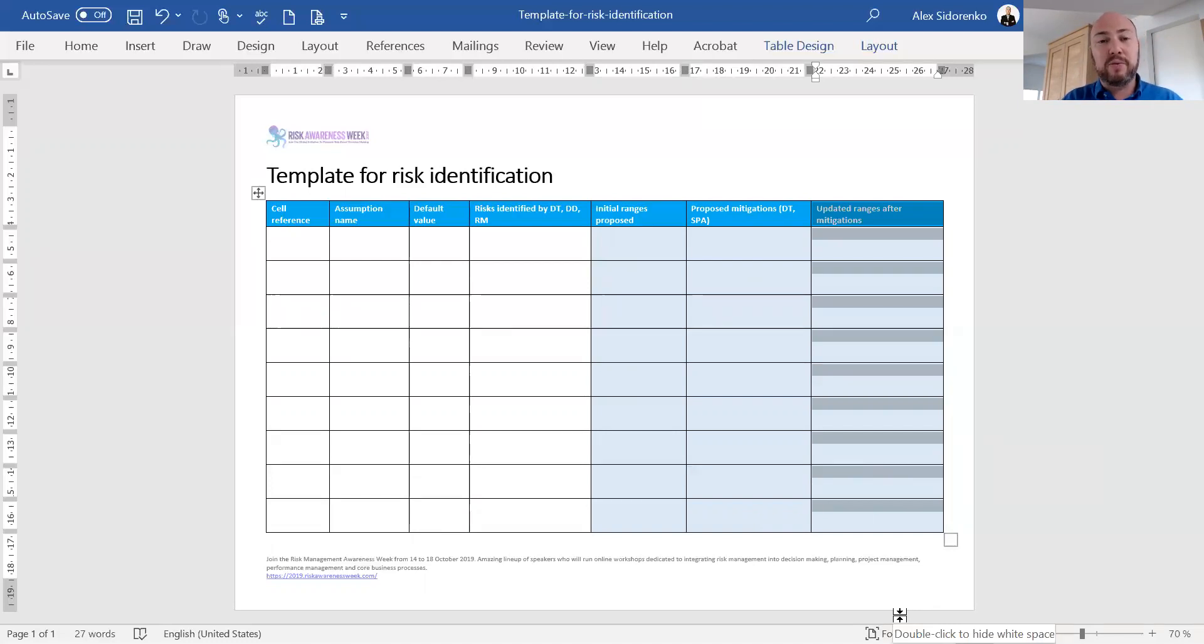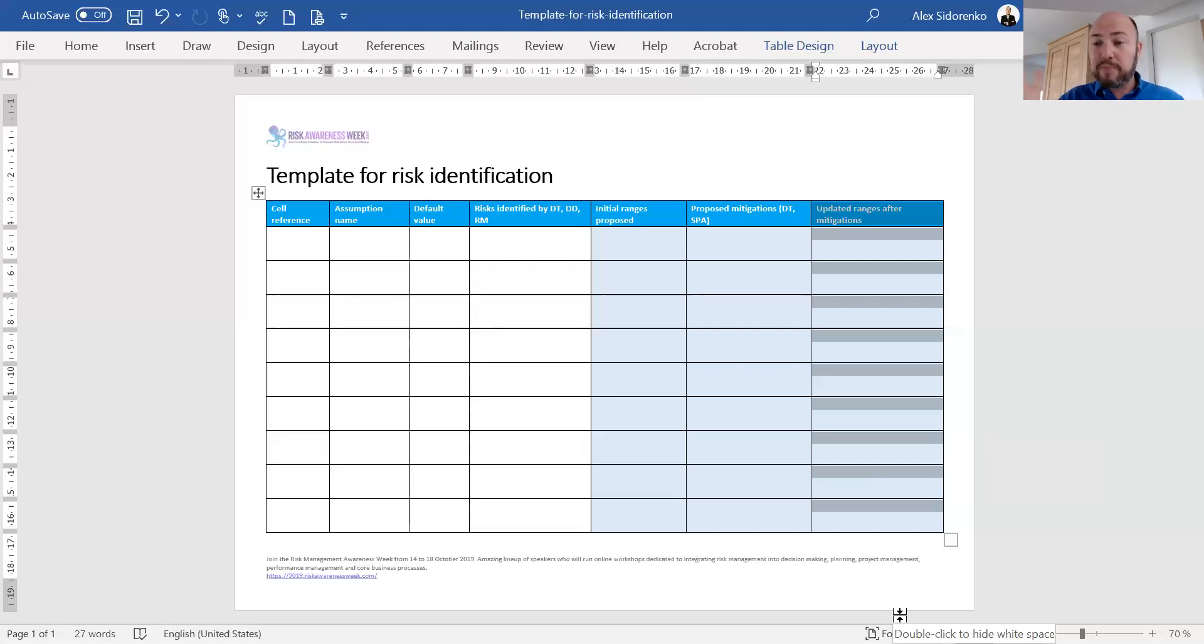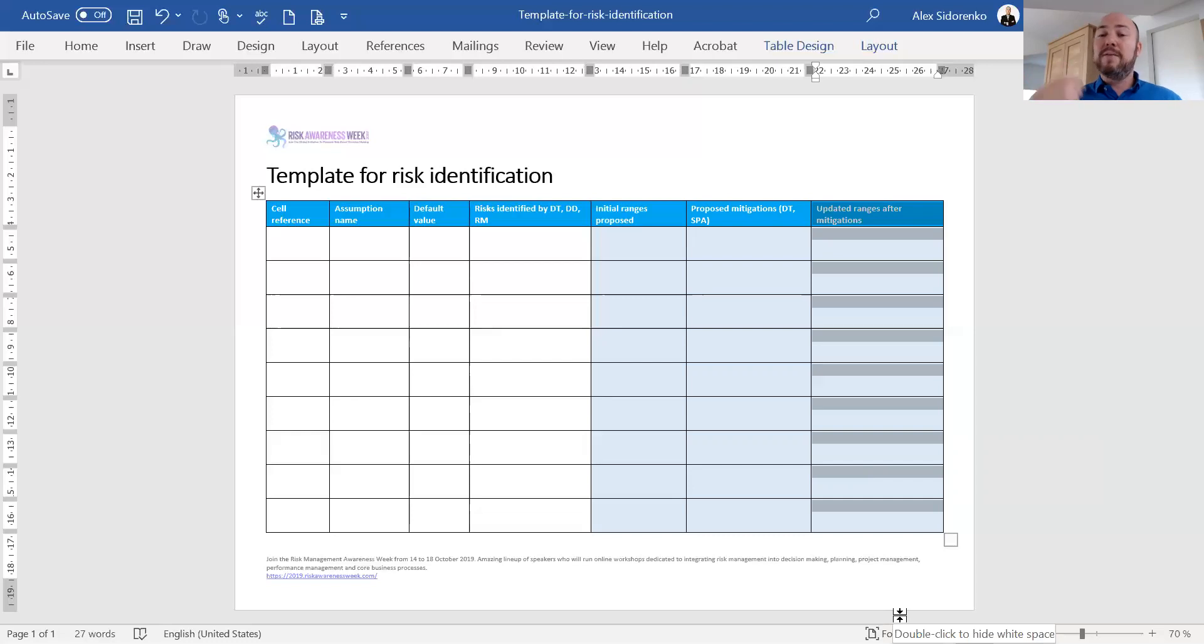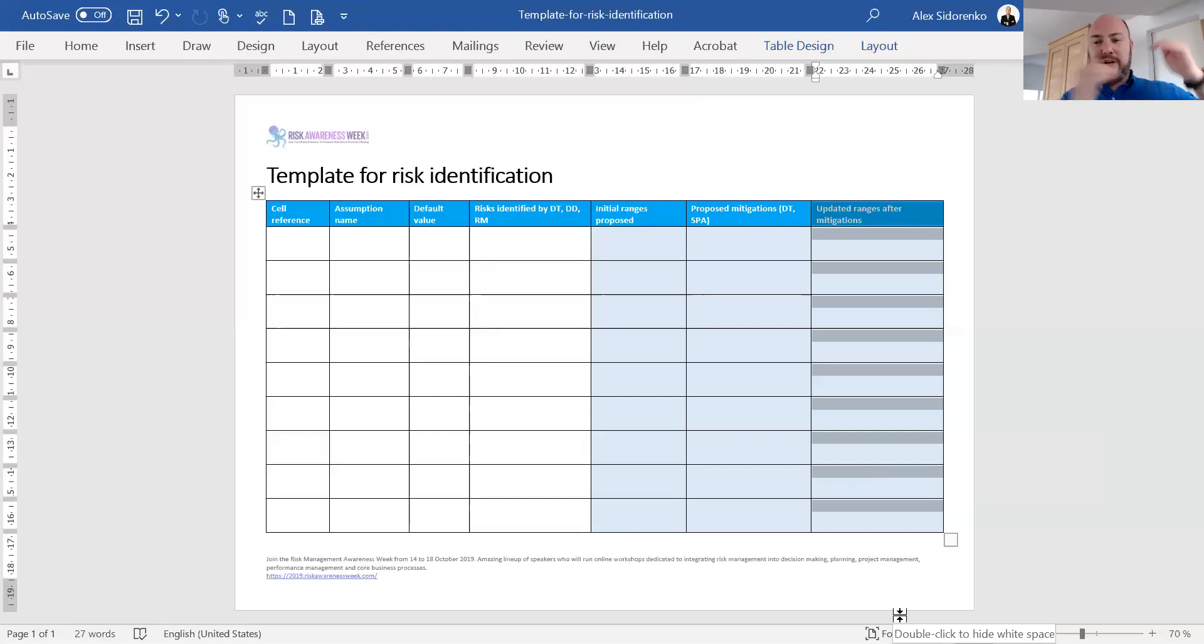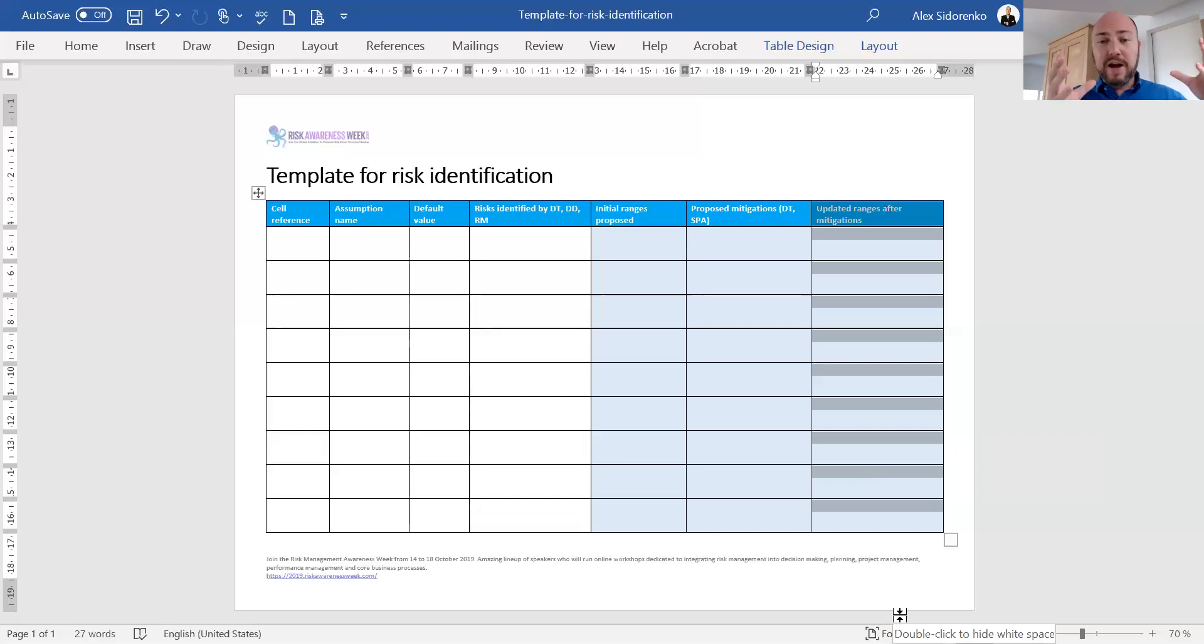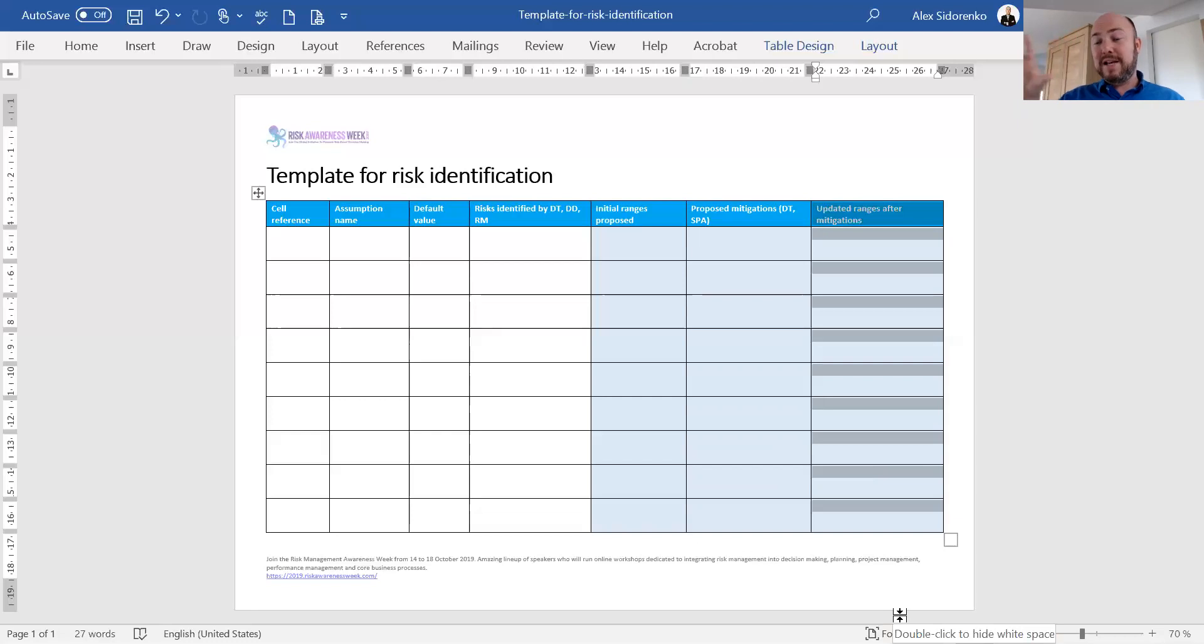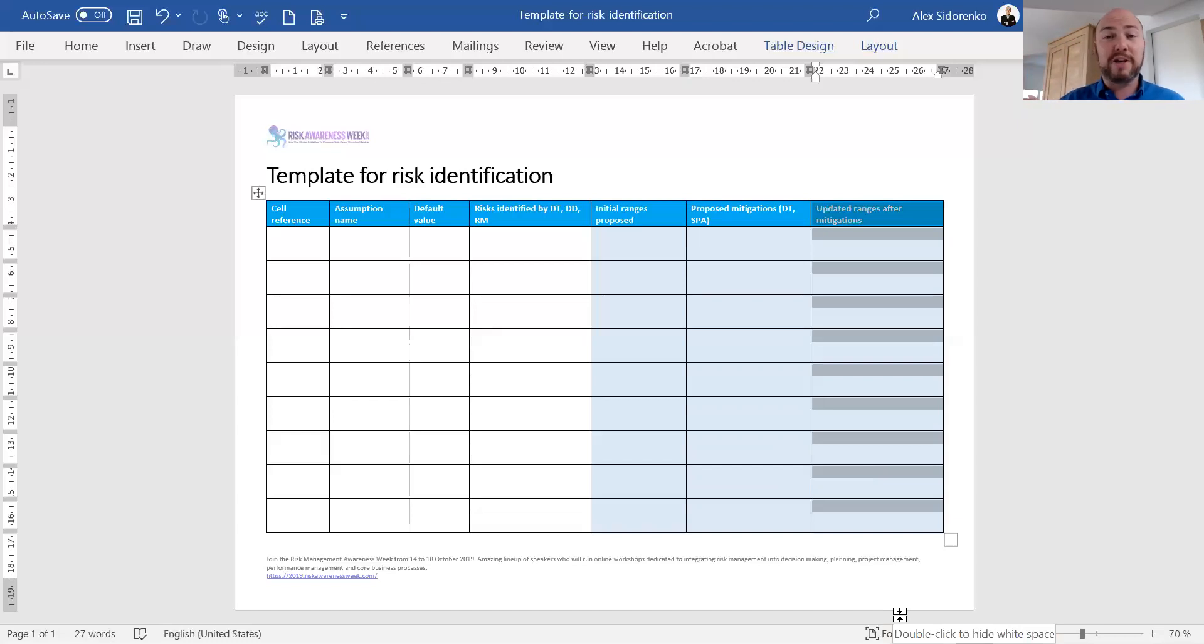What we're aiming to do is reduce uncertainty on each of the assumptions based on the mitigations that we mapped against the risks, that we mapped against assumptions, that we mapped against the decision. Then we re-run the simulation. Now we have one simulation which is our initial risk exposure, and then the second one is our updated risk exposure. That's the updated risk exposure that we want management and the decision makers to see and use for the actual decision making.